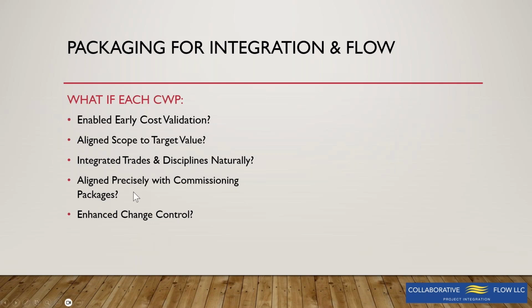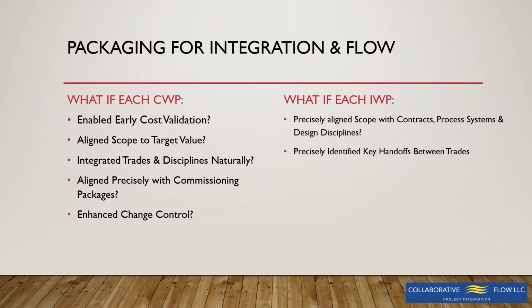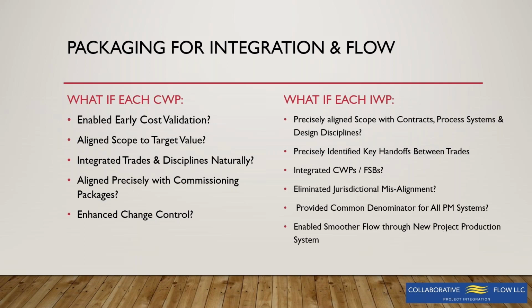So your CWPs were exactly the same packages that you're going to use later on to work through your commissioning process. And of course, that helps you for change control. So for me, CWPs look like fundamental scope blocks. And then this was about IWPs, but IWPs can also be a great help for us in aligning and eliminating jurisdictional misalignments and setting the project up for smooth flow.